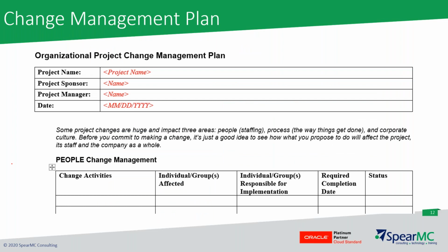The next is the change management plan. This is part of the process building block. I just have an excerpt here to show you what it could include. The real crux of this is that you should always keep sight of and keep a record of all changes as they relate to things like scope, right? You try to outline 100% of what is in scope and what is out of scope for all your various projects on your roadmap. But any deviation from that is relevant here.